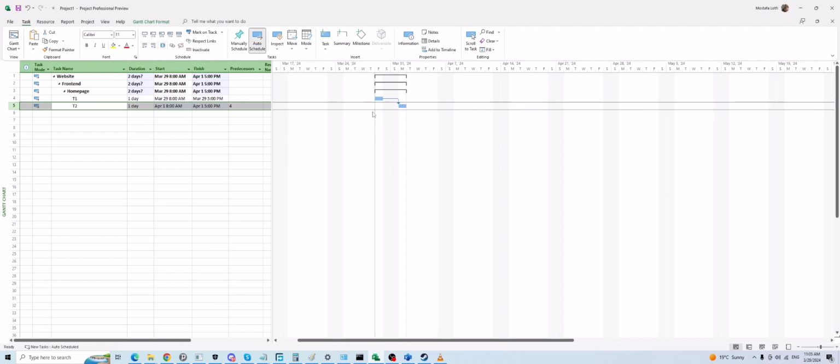So if person number two is not available for the next 1 hour, then person number one should continue his shift till person number two becomes available to immediately start working and monitoring. That's the difference between finish to start and start to finish.